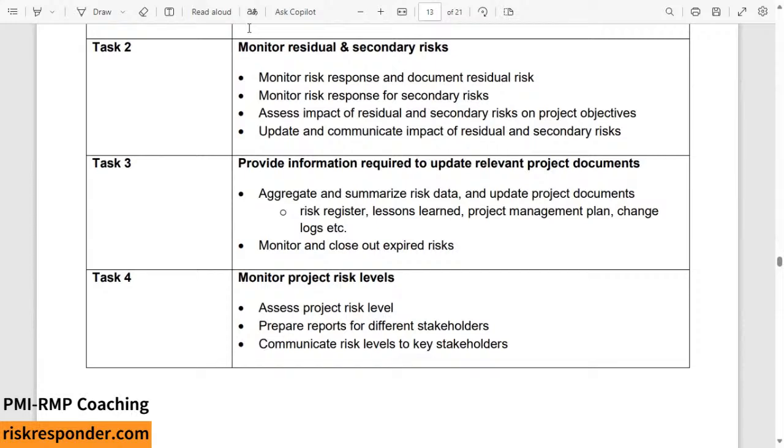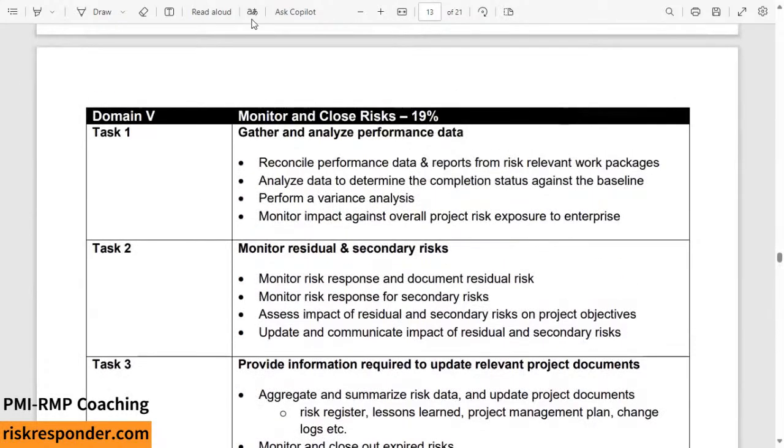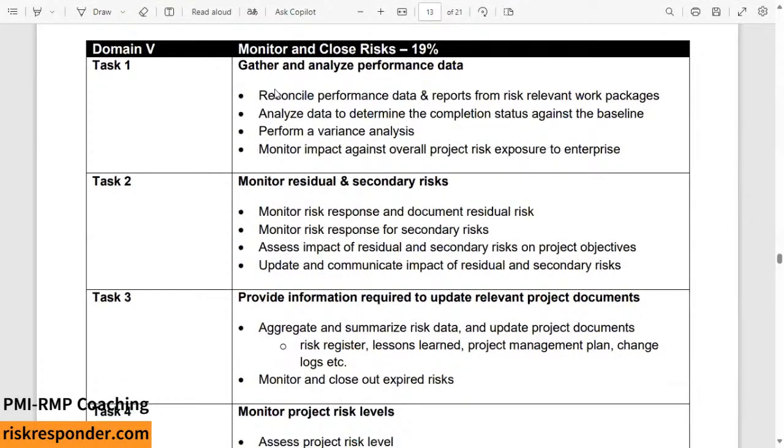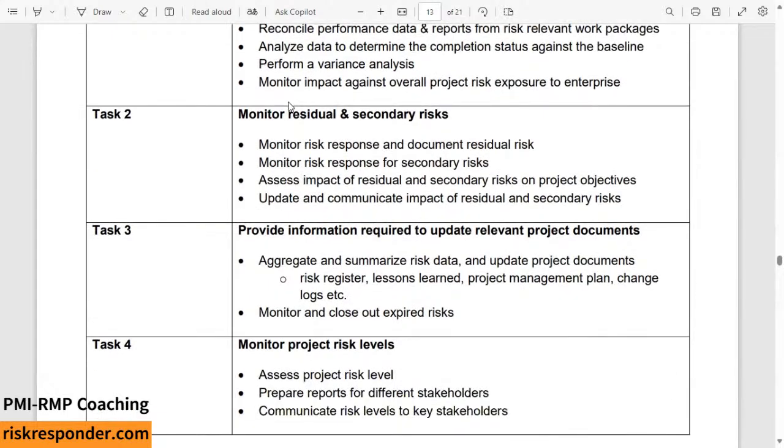Like a cascading effect. When we look at the world of risk, there are risk responses, but there are also cascading effects, where your response leads to something else. That's a secondary risk, and as a result, sometimes you don't have a comeback to that. So you've got to think on your feet with the team and look for a way of getting around that.